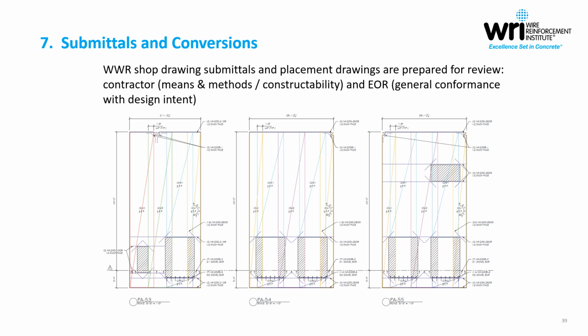Here are those same color-coded mats, just populated into specific wall panels. Again, the scale is very small, and I apologize for that, but you're taking the piece marks and populating the wall panels, so it really becomes puzzle pieces that have already been worked out for you. You have a kit of parts that, once it's on the site, goes into place based on this color-coded solution.